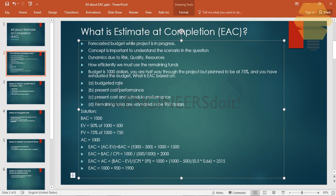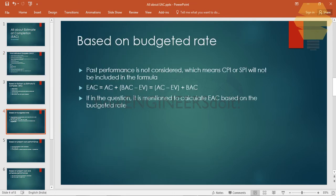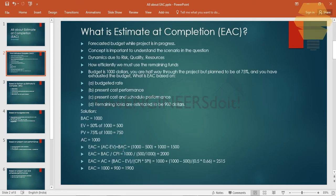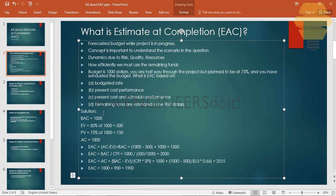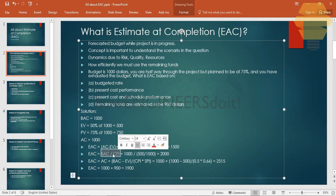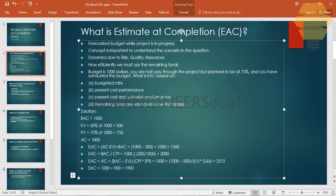Scenario 1 — Budgeted Rate: EAC = AC + (BAC − EV) = $1,000 + ($1,000 − $500) = $1,500. Scenario 2 — Present Cost Performance: CPI = EV ÷ AC = $500 ÷ $1,000 = 0.5. EAC = BAC ÷ CPI = $1,000 ÷ 0.5 = $2,000.